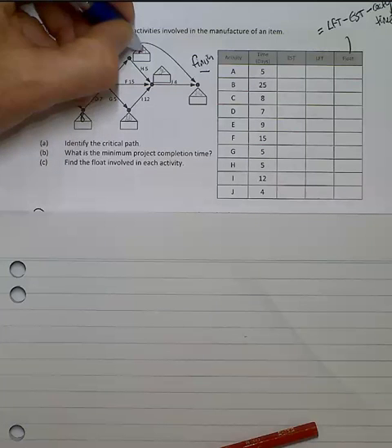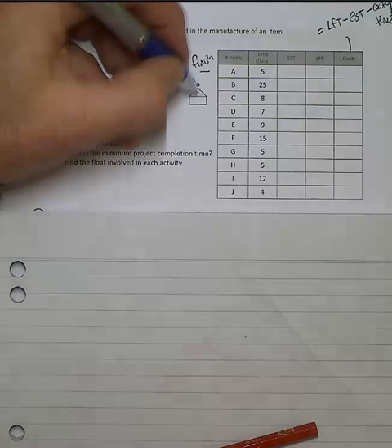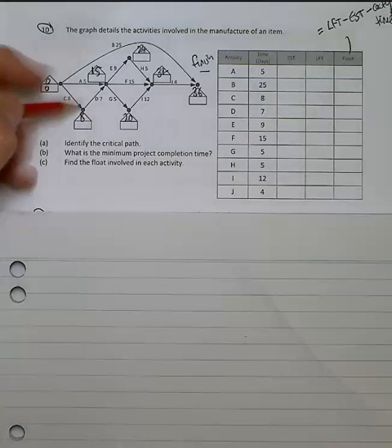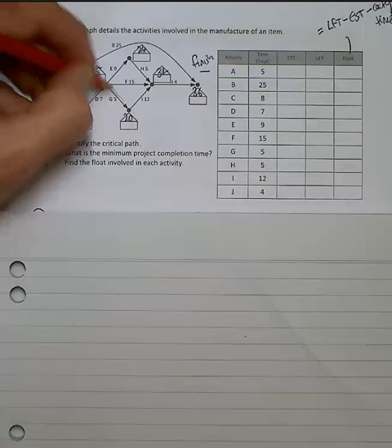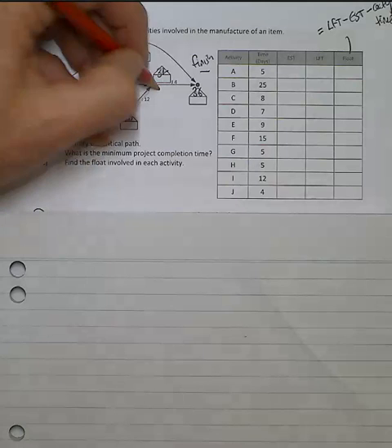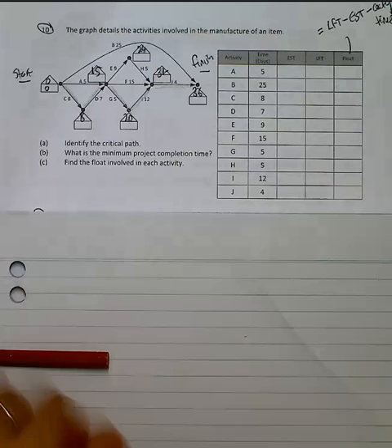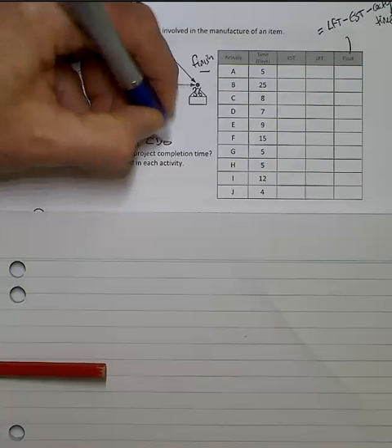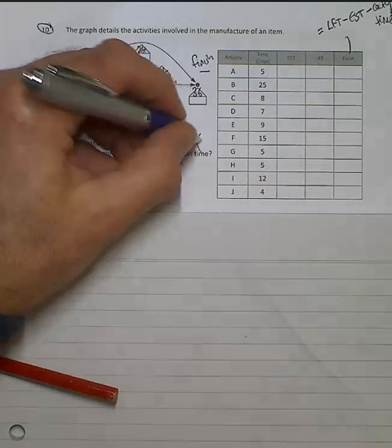And I'm pretty certain that we've now got identified the critical path. The critical path, taking through C, D, G, I, and J. So the critical path, and I don't have time to put it there, but 36 days.